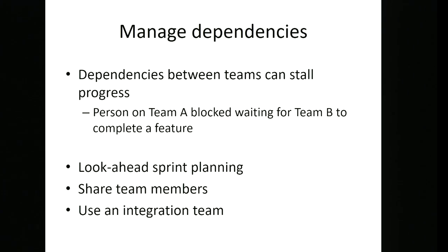So what's the difference between the last two points? Seems similar. Shared team members or an integration team? So I think basically you're right. I think the end result is similar, but it's just a slightly different way of doing it. An integration team would be a completely separate team who takes bits of product from the other teams and just ensures it works together.